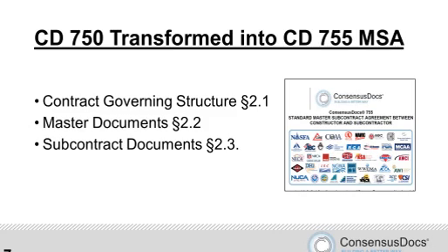I know Joe's going to get into this in more specificity later, but the idea here, generally speaking, is that there are often standard requirements that a contractor has, maybe standard forms, standard procedures, that they include with any standalone subcontract that would also be necessary to include as part of establishing a master subcontract relationship. And so those would be listed out, referenced in 2.2, and included most likely as an exhibit to this agreement.